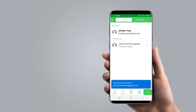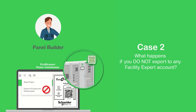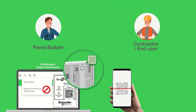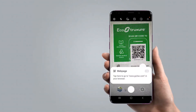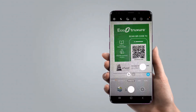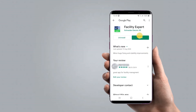We just went through the first scenario. What if Faris didn't click that export button to export the data to any Facility Expert user — what will happen when someone scans that QR code? The second case is if you don't want to be involved in any post-project activities. In this case, your contractor or end-user can scan the QR code to take over the digital logbook. By scanning the QR code, a wizard is displayed to guide the user to take over the information and become the manager of the assets in Facility Expert.